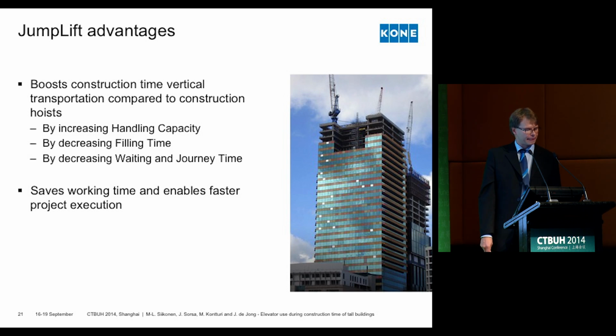Okay, so jump lift has certain advantages to boost the construction time vertical transportation. So it increases handling capacity and then decreases the filling time. And by this, it also saves working time, which also enables faster project execution than without construction time use of elevators.